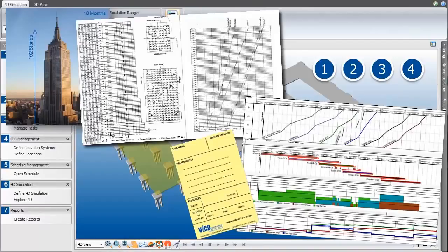They used actual quantities per location to plan. They managed by production rather than just by the end date. And they were trying really to reduce the risk of that cascading delay that we'll see later. This method was specifically designed for construction.